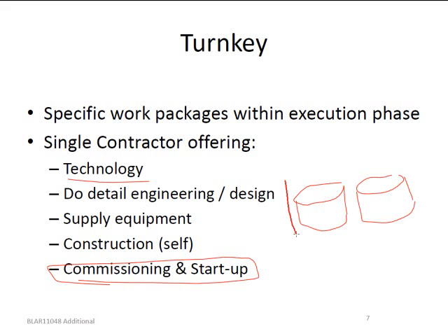Alright, so how do we do it? These are items that are technology driven. They're designed by turnkey contractors. So a hint would be to outsource the whole of the tank farm installation for this question to a specific contractor. Alright, they will come in, install it, provide the technology, and make sure that when they commission it and they start it up, everything works according to plan.